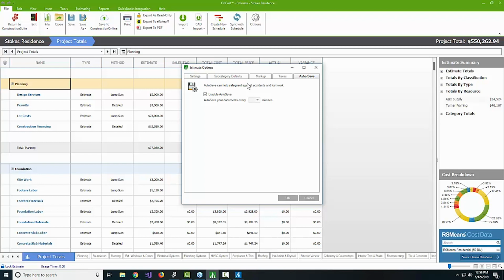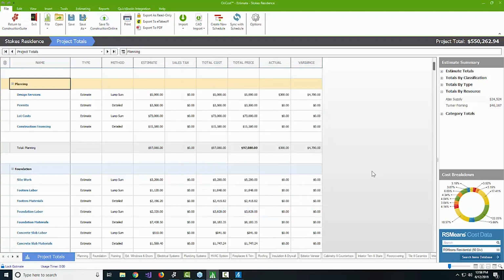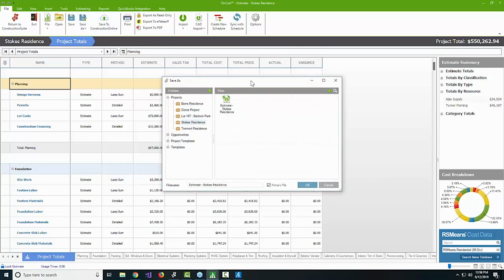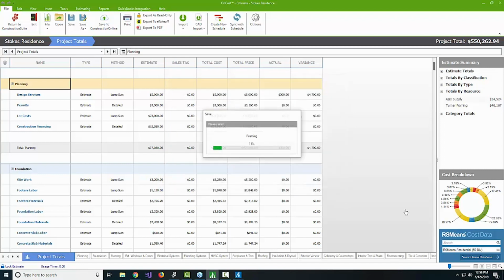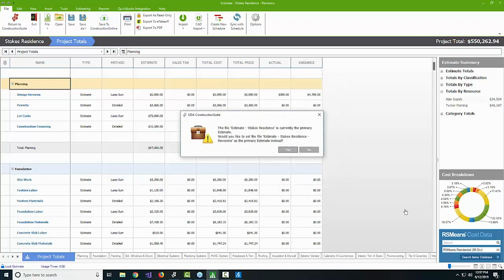Quick word of caution though, if you're making adjustments to one of your estimates, maybe because you're negotiating with your client, open up the original estimate and start by saving a revision. This is going to give you a second copy, or I usually just call them revisions, or a negotiated copy, so that you can maintain the original version and have this as the primary one that we're going to be adjusting the numbers on. Earlier, Holly, you made the comment about trying to get the 35 down to a 30% margin.